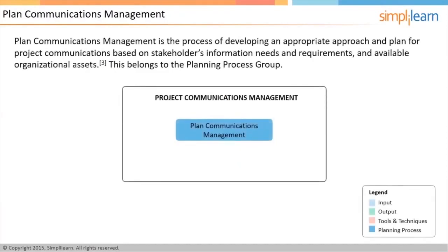Plan communications management is the process of developing an appropriate approach and plan for project communications based on stakeholders' information needs and requirements and available organizational assets. This belongs to the planning process group. Stakeholder Register is an important input to this process.